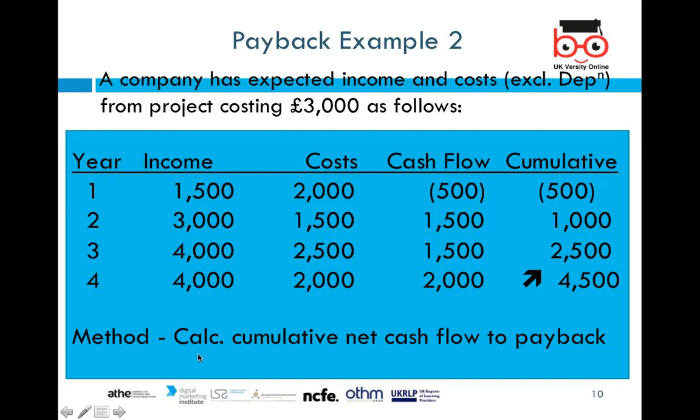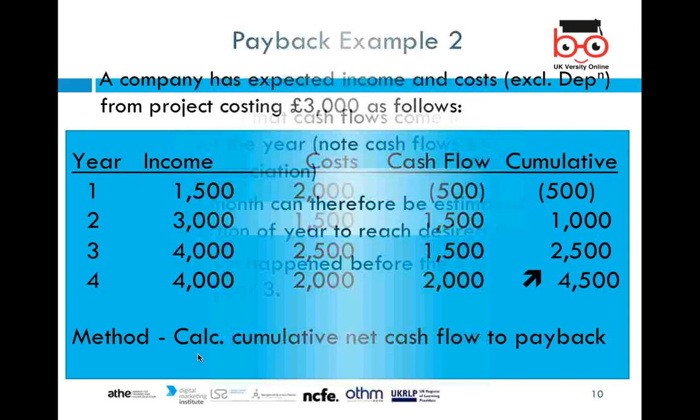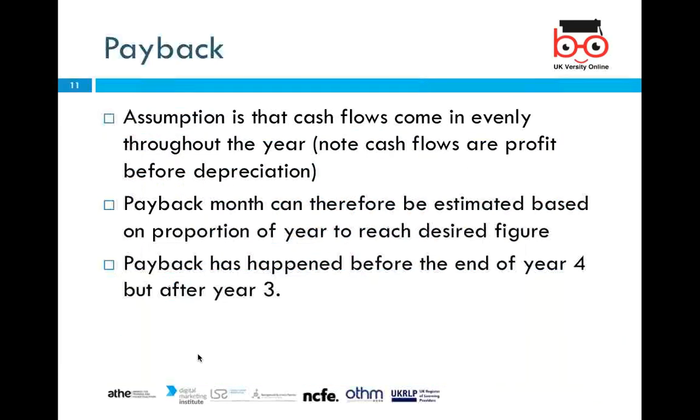So the cumulative net cash flow method is used to calculate the payback period here. So this is 3.5 years. We calculated the payback period by using the cash flow and cumulative cash flow method. Payback basically assumes the cash flows come in evenly, equally throughout the year. So cash flows are profit before depreciation, always before the depreciation of the machinery. And the payback month can therefore be estimated based on the proportion of a year.